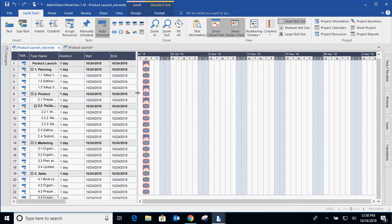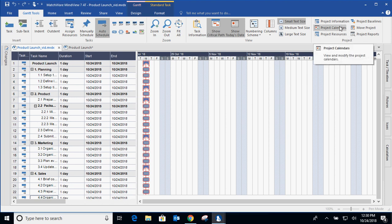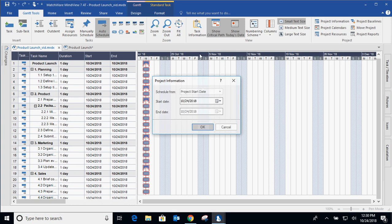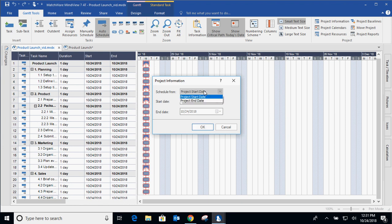Now the first thing you want to do when you get started with a Gantt chart is talk about the project calendar. So actually even before project calendar, I'll go to project information. What project information allows you to do is create your start date. So as you're adding the durations to these tasks, it'll automatically calculate the end date and vice versa. If you know of a release date and you want to calculate when you need to begin the project.